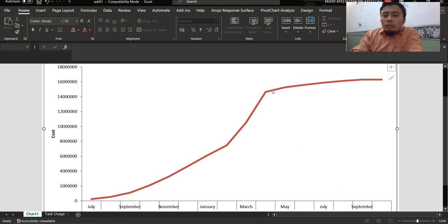So it shows that the client has paid you a lot of money, but the remaining time is still big. So preferably you should adjust your schedule so that you have a gradual continuous increase in claim, so that the client won't feel that they have been paying you too much, or that you are concentrating a lot of work up to that point. You are concentrating too much workforce. For example, in this area you are focusing so much manpower.